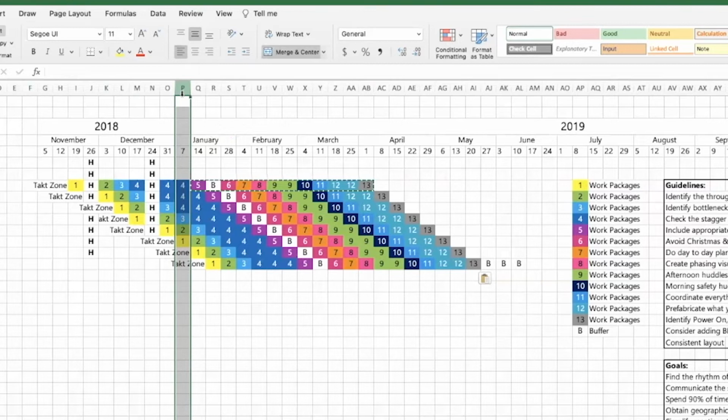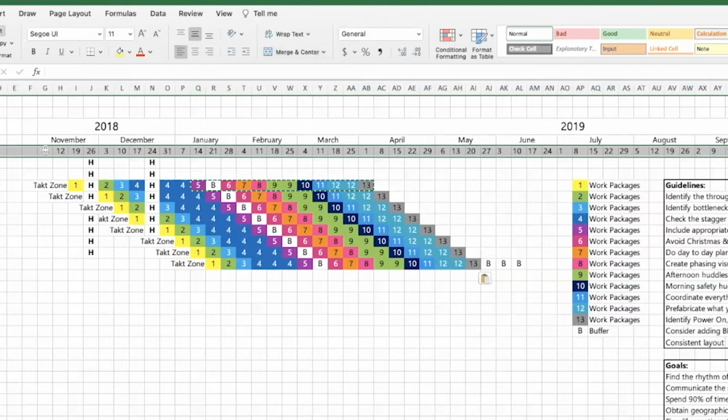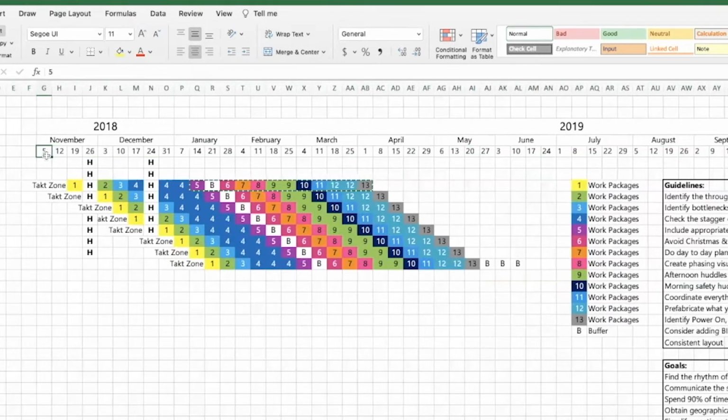The format is shown as such, so every column, like for instance this one right here, is actually a time scale. It's a time duration, and it symbolizes the transition of takt wagons from takt time to takt time, meaning that when you go from one takt time to another, the takt wagon designations or where they hit or where they occur changes. So this row number 5 here shows the weeks, and the number in there is the Monday of that week, so it shows what week that they're actually working in.